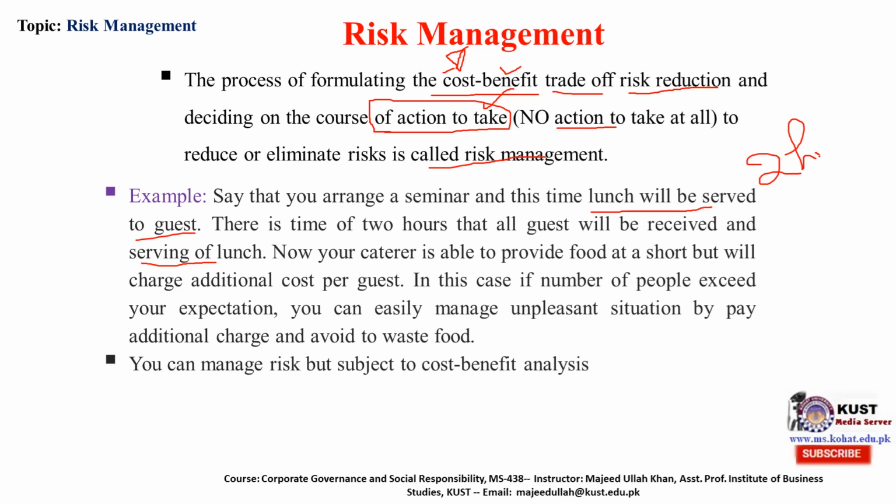to prepare extra meals. Now the caterer is able to provide food at short notice but will charge an additional cost per guest. In this case, if the number of people exceeds your expectation, or the number of guests exceeds the plan or the already invited guests, you can easily manage that unpleasant situation of shortage of food by paying an additional charge to avoid a waste of food.